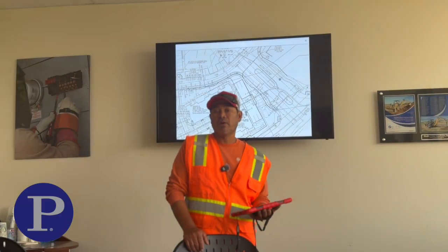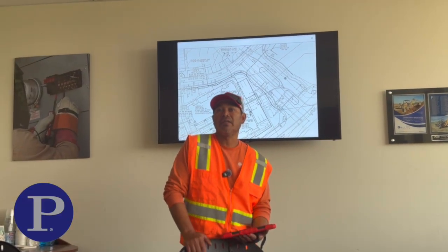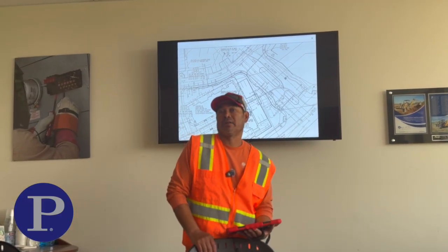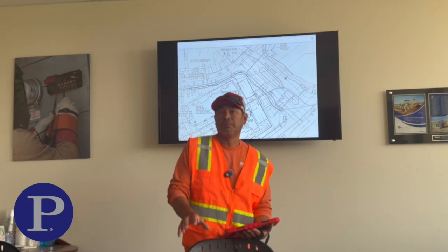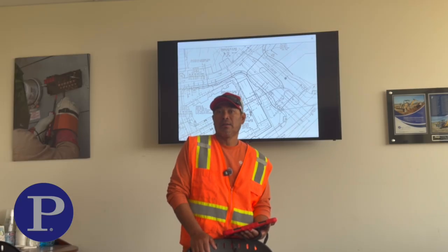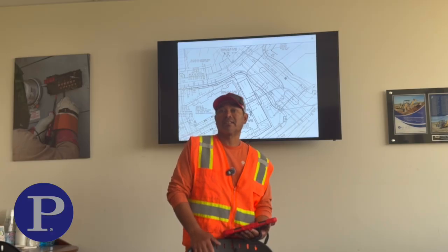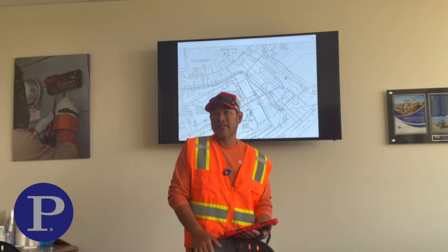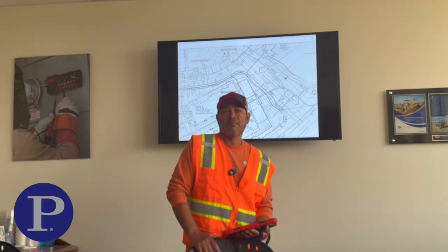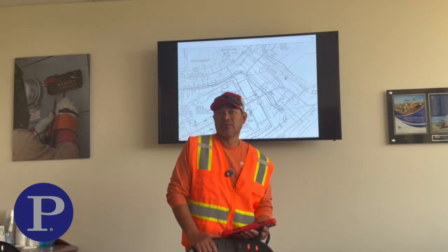Because when you get your scope of work, it doesn't give all the details of what you need to order. That's going to help us understand that we have to pay attention to the print, not just the scope of work, because in the scope of work they just give us the linear footages. They don't give us all the angles: 90s, radius, 45 degrees. So every different product has different challenges when we order.